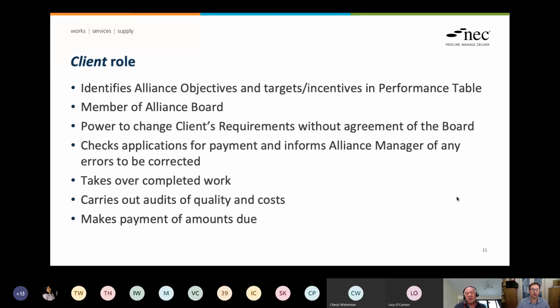So I think it's dependent upon the locality of the project and the procurement law that surrounds a particular project as to how much you can do in terms of negotiation versus competition. I mean, let's be honest again, most of the work will inevitably be done by subcontractors, and they may take up 60, 70, 80% of the value of the alliance itself, and much of the competition will come through that process.